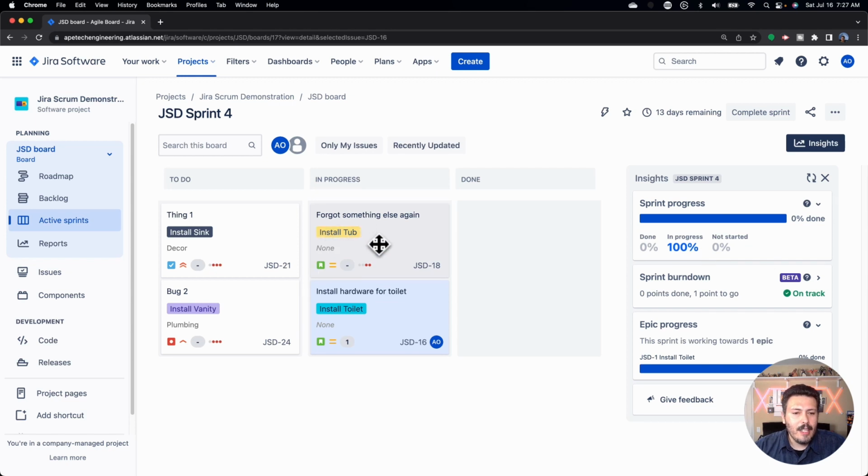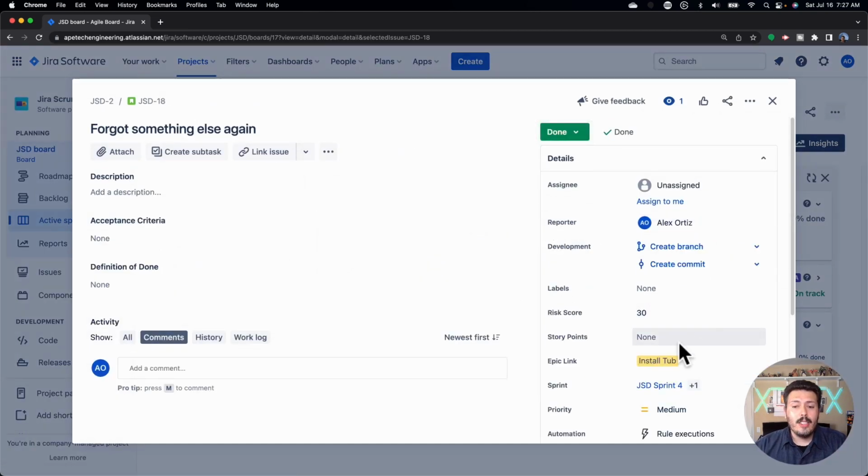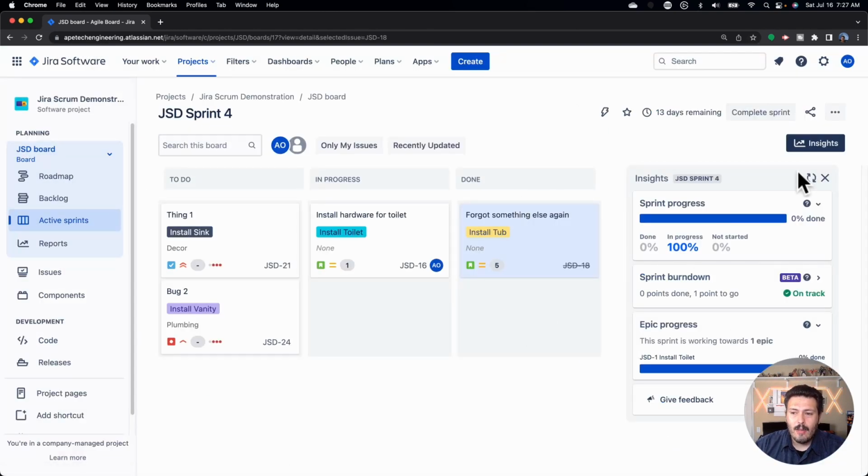And it definitely looks like the points are very key here, because even if I move something to done, you're not getting points until, or I should say, you're not getting credits until you ensure that each of your items actually have a story point. And so if I move this and I hit refresh, you'll see that I'm now more appropriately 83% done, because based on 2 stories that I have, one of them is done and one's in progress. These 2 aren't getting credit because they don't have points.